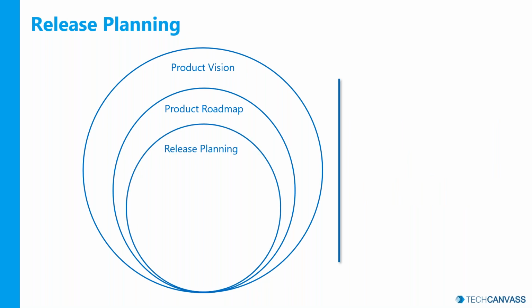Again, for a Scrum team or an Agile team to implement it, that level of abstraction is not good enough, right? They need further elaboration on the features. That is why the next level of planning in Agile is called release planning. In release planning, you have specific milestones, right? At the end of month one, what are we going to release? At the end of quarter one, what are we going to release? So it drills down from feature level to typically stories level, right?